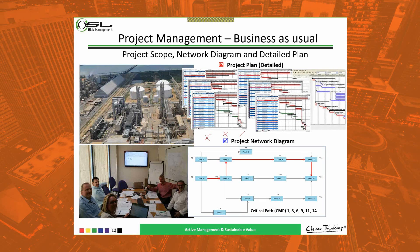In any organization, when you get the detail plan — or if you don't have one, you can create your own network and communicate that information with a plan — it's about understanding how macro activities are interconnected. Instead of changing all the interconnections in Primavera P6 or similar tools, you sit down and understand the project network and its interconnections. Right now, 80% of project managers work at the detail plan level, and only about 10% of agile companies work at the risk management network level — but that is not enough for formal quantitative project risk management.